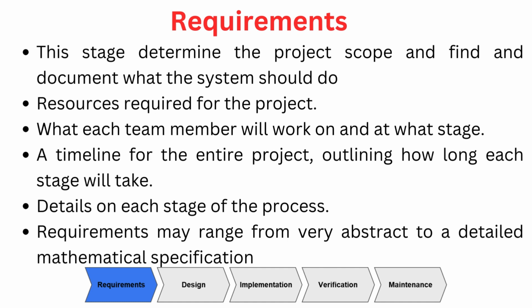But at the end of the stage, the team must be fully aware of the exact requirement, what is asked by the customer, and when they need to complete the project. The key deliverable of this stage is a detailed software requirement specification. We call it the SRS.